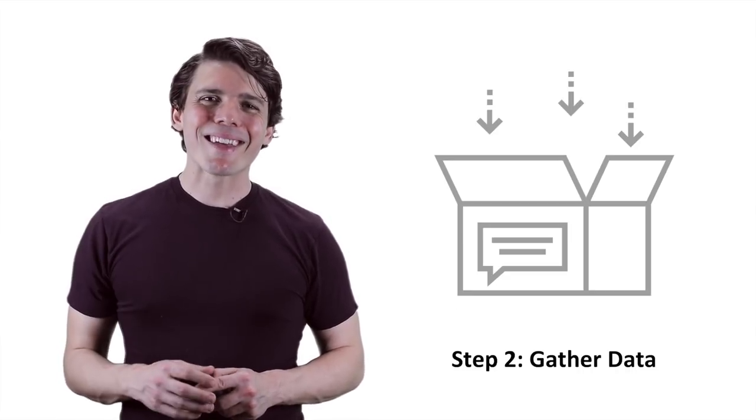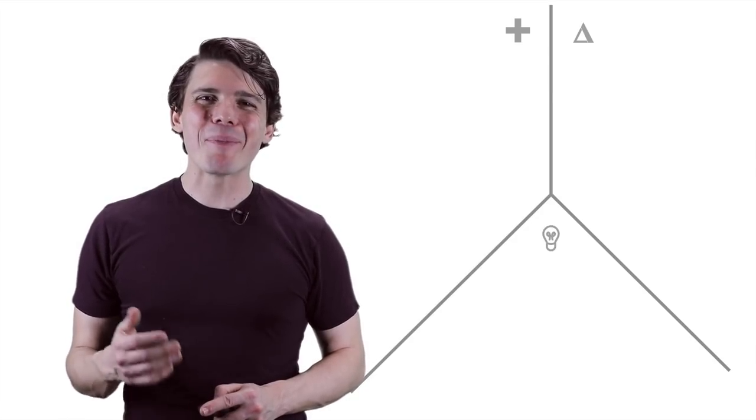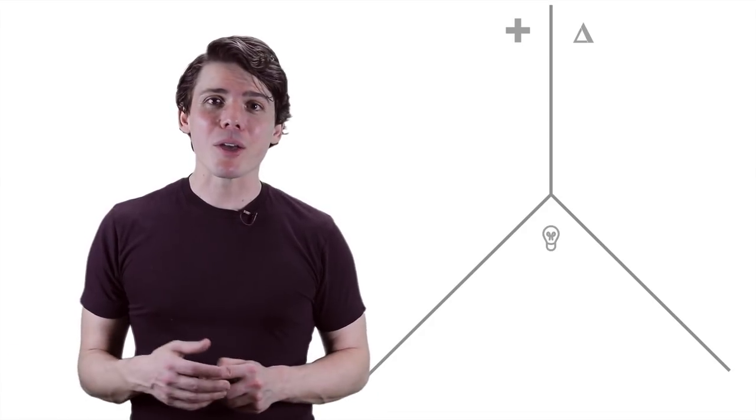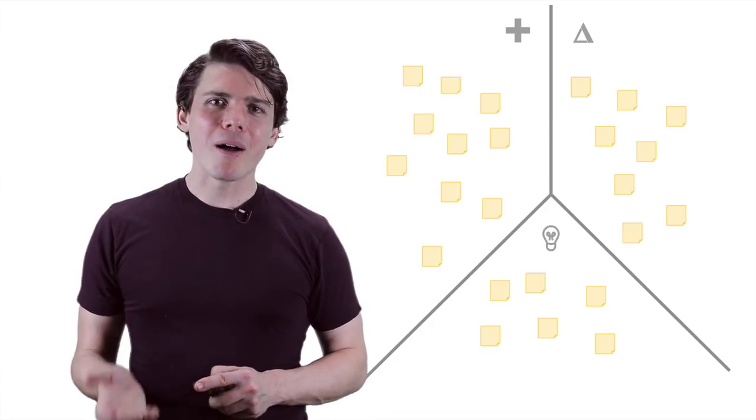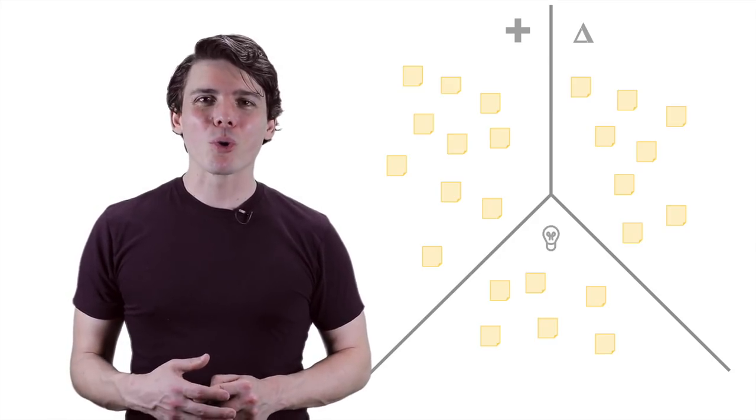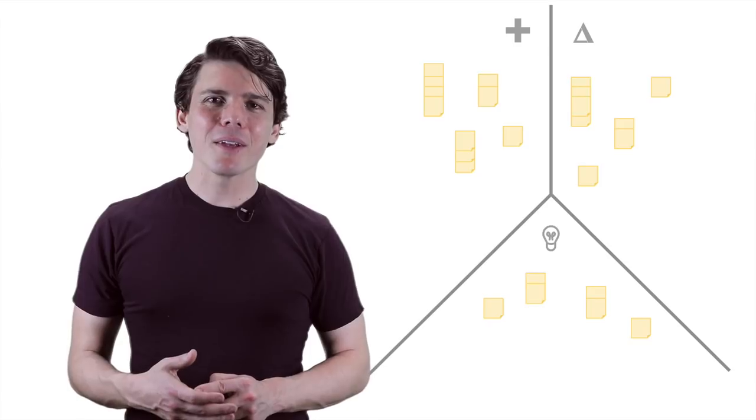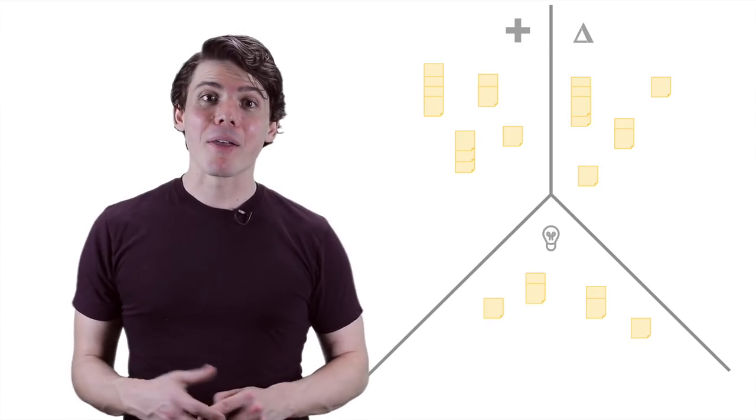Step two is to gather data. What happened in the sprint? I like to use a positives, deltas, and insights collection device. Ask each team member to come up with as many positives, deltas, or things they'd like to change, and insights as possible. Have them write each positive, delta, and insight individually on sticky notes or their digital equivalent. When the team has run out of thoughts or the time box has elapsed, place the sticky notes on the wall and group like items together.